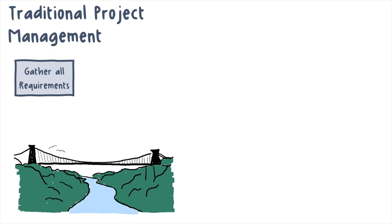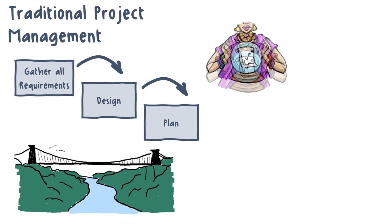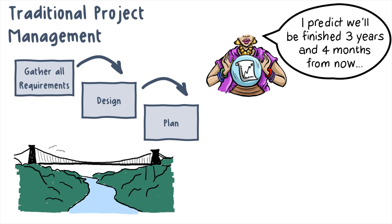Based on that list of requirements, we will design a solution. Note we won't start designing our solution until we have finished gathering and documenting our requirements, because our civil engineers are going to be coming up with the design based on those requirements. Then we'll be able to use that design to understand exactly what resources, materials, and budget we'll need — map it all out and plan the project in great detail. We'll be able to predict that we're going to complete the project in, say, three years and four months. This traditional approach is sometimes referred to as predictive, or even plan-based — we're following the project plan.